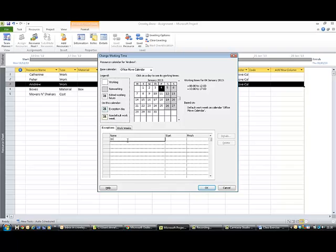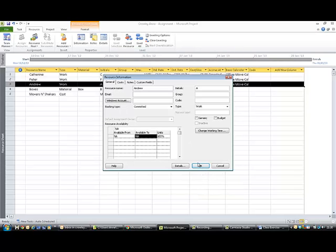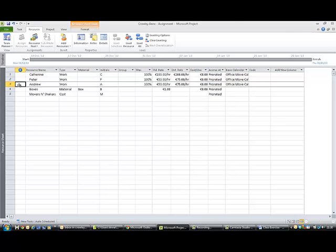And then down here say In-House Training Day, and the 4th of the 1st comes in for Andrew, Andrew's training day. So we'd say okay to that, and we say okay to that. And now he won't be assigned any work for the 4th of January because of his training day. And it might also be useful to just note that on the left-hand side here so that you know that that's going to happen.